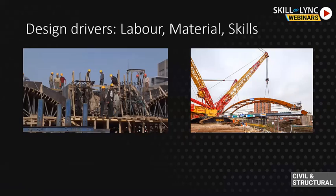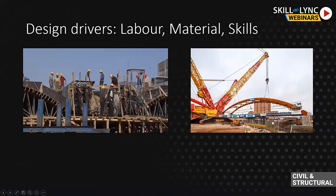Another design driver is labor and material availability. In Lebanon, for example, labor is quite cheap and formwork is easy to erect, so it tends to be more cost-effective to design an in-situ concrete structure with a lot of people pouring and building reinforcement. This structure in the UK is different — in the UK, labor is very expensive and material is relatively cheap, so you tend to go for a modular option like a steel bridge, which you can fabricate in a factory in safe conditions and then quickly install on site, because site delays and labor costs are much more expensive.